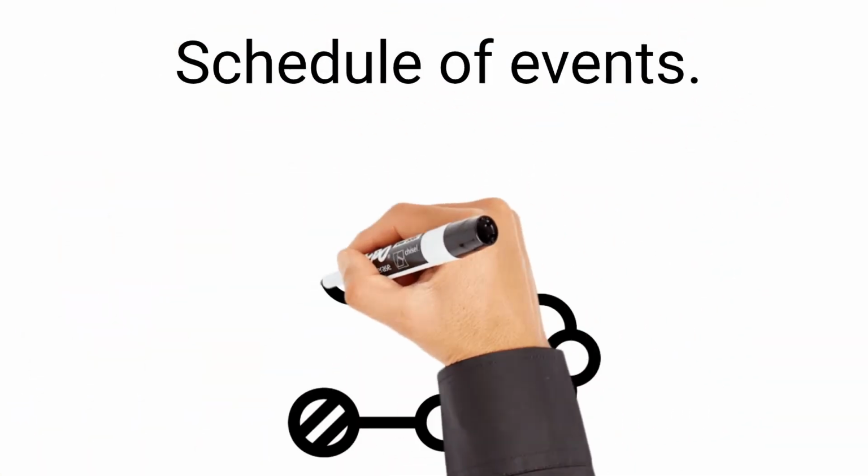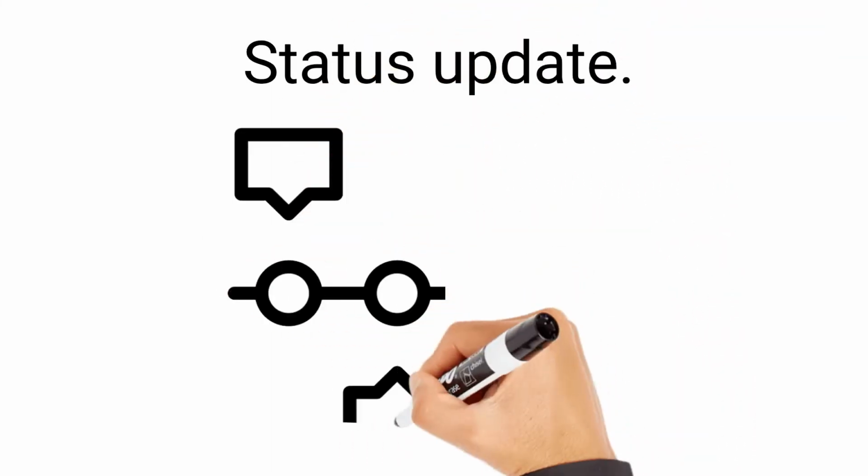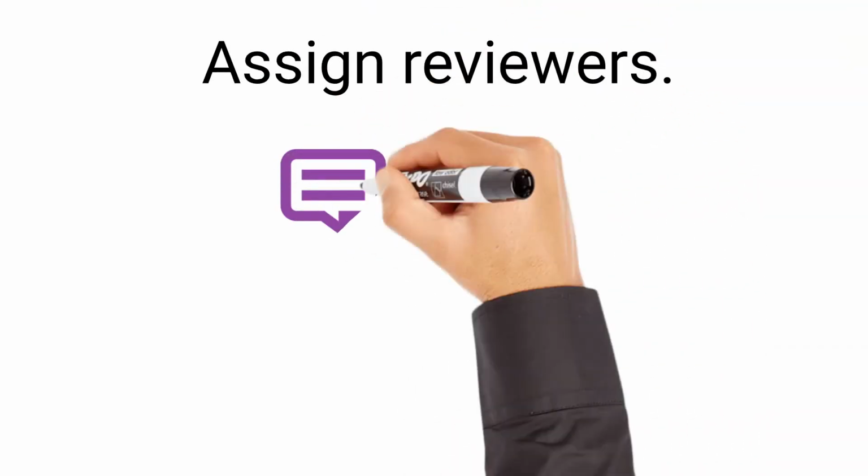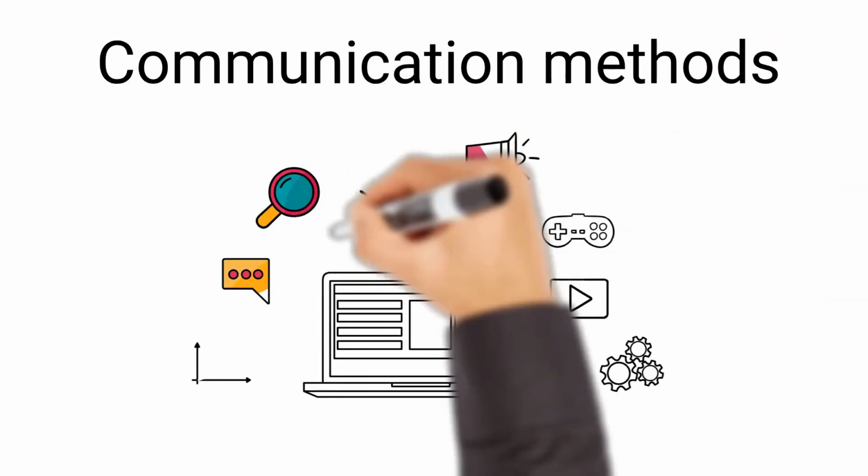The sixth is to designate status update types, where they will be located, and who will update them. The seventh is to assign reviewers to tasks that require them. The eighth element is the definition of the communication method, date, time, and frequency of each major communication type.